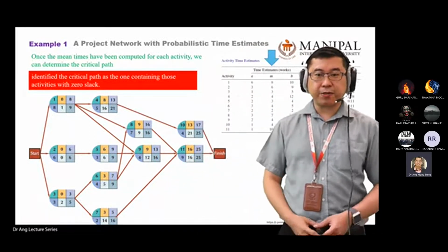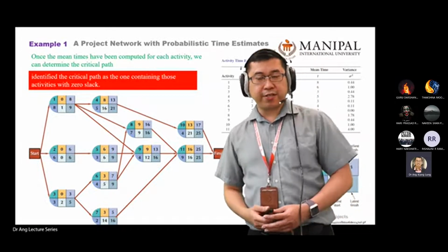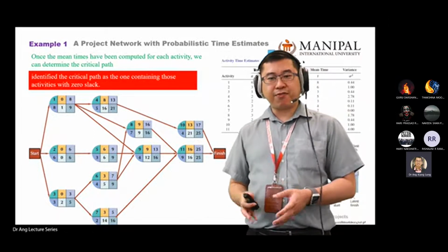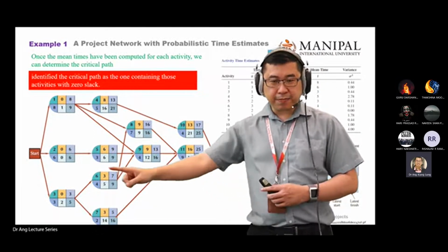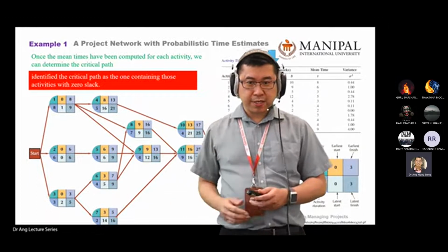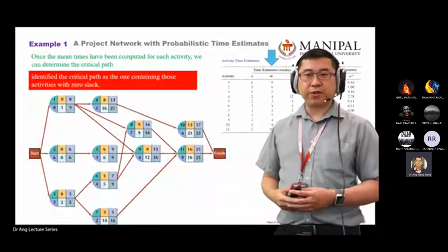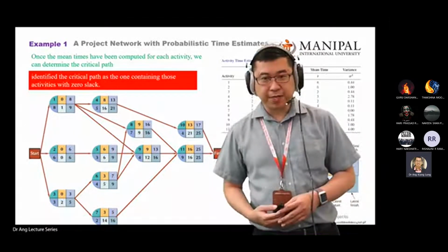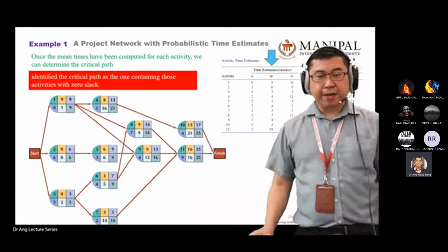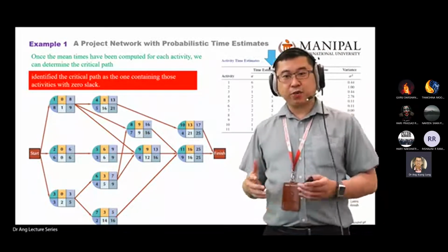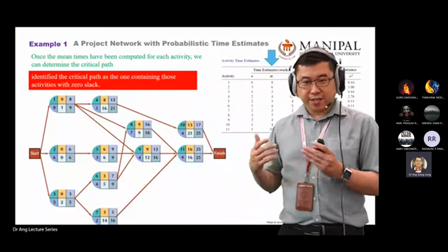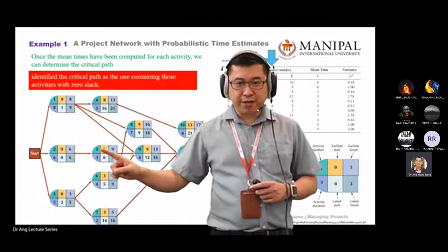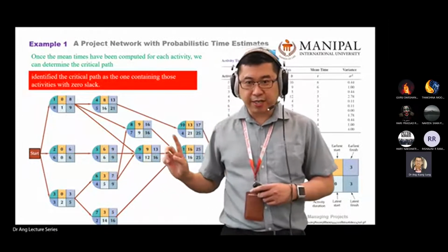Okay, the rest, are you able to see? Are you able to understand what Nevin said just now? Are you able to find the critical path by looking at the diagram, just by comparing the numbers? Or if you're hardworking, you can calculate the maximum time, or you can do mapping one by one. But the fastest method, since we already learned the method in the first session, apply it. You go and see whether there is the same number or not. Then you look at the arrow. Is it connected or not?